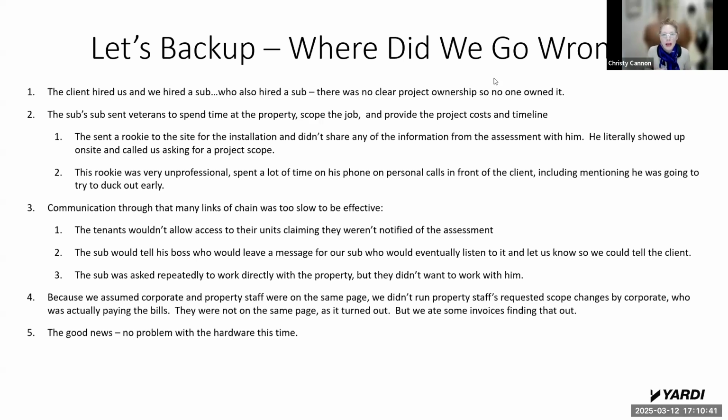So this is what I mean by holding your sub accountable, keeping communication going, because the other problem with a sub who hires a sub is that all of these important things that happen when that electrician or plumber gets on site, like the tenant not allowing access to their units because they weren't notified of an assessment by the property, well, that is like a game of telephone. The plumber, the sub, calls his boss, leaves a voicemail. His boss eventually gets that voicemail, calls the sub that hired them, leaves a voicemail. They eventually get it and call Yardi. It's like 3 days later by the time we find out that there's any kind of issue.